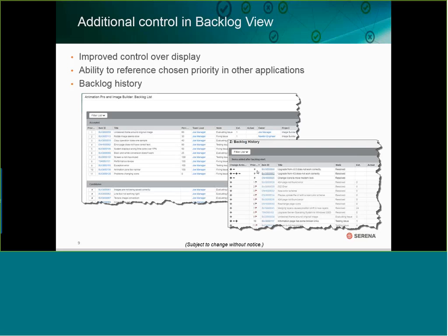Or if you're running ahead of schedule and you can actually put things in, or you have a customer request or some sort of priority request that comes in from your customer source, and that gets added to the backlog, you can also track that as well. So you can see there on the bottom right of the screen, pluses and minuses. Plus shows that something was added since the backlog was created, and the minus means it was removed. And we keep track of something going back and forth. So you can see that some of them have 2 pluses and 2 minuses. That's because something was put in, removed, put in, removed. And so it keeps track of all that history as it's moving forward.